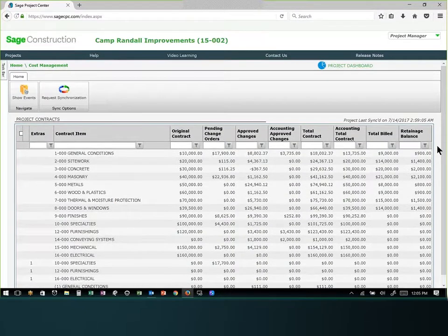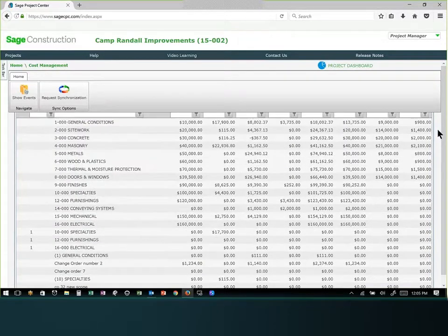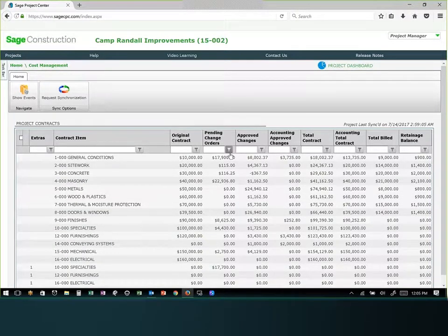We can, as you may or may not know, handle quick adds as well as extras on the contract side and the estimate side. So you can see here on the top, we sort down to your original schedule of values, and then below that, we're going to put all the quick add items in here. What I'm going to do today is walk through and track the process of creating a change order and step it through the different processes, and I'll go back so you can see where the money is being allocated. So we'll use line item 16 here so you can see when it comes up to pending and when it comes up to approved. Okay?